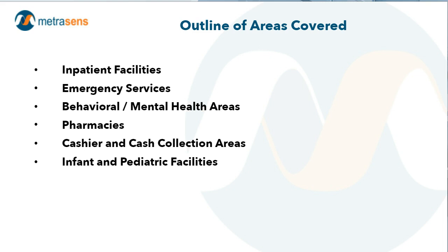which is the value engineering phase. And it's much easier for your stuff to be value engineered out if it's just you advocating for it. But if the medical director and the nursing leadership are standing on chairs and saying, we want this stuff in, it's much more likely your security stuff is going to be in. Particularly with inexperienced architects that haven't worked in healthcare much, or designers that may be moved from another discipline, they may not pay security the attention that it deserves, not having had that experience.